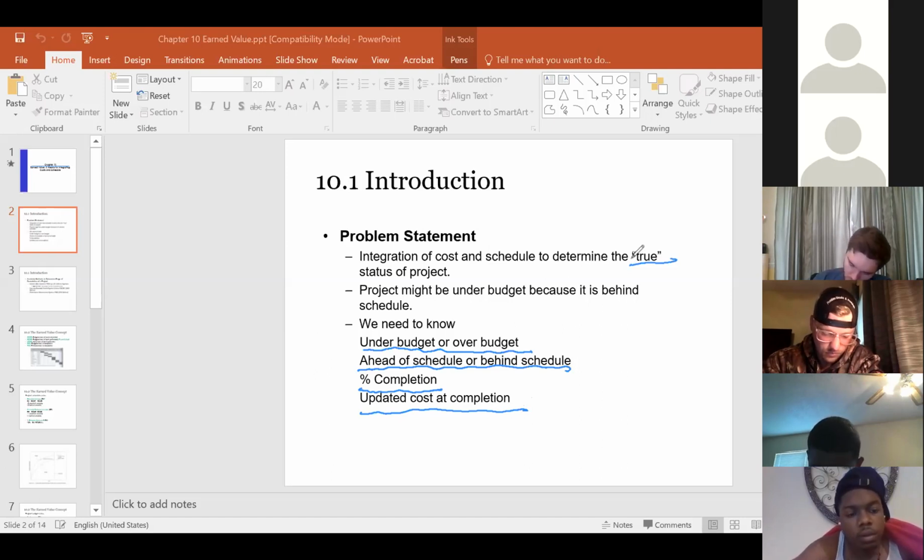So sometimes you are under budget. For this project, by this month you scheduled, for example, to spend $10,000, but I only paid $1,000 so far. So am I under budget? You can't tell, because it depends on how much work you already finished. If you didn't even start and you already spent $1,000, you are not under budget. You are over budget.